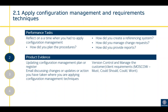Imagine your project is some sort of manufacturing process — configuration management would outline every piece of equipment used, the specific sizes and dimensions, any screws, nuts, or bolts, all individual components. It defines what they are and outlines the suppliers and where you can get them. It basically defines each component so that if something happens — a shortage, or after handover there's an issue with the completed product — you know exactly what components were used and can find replacement parts. In a large project, it also ensures all teams are using materials and components to the same standard so everything fits together.